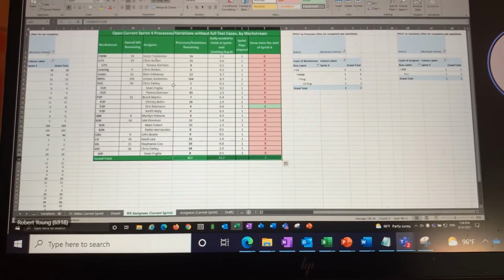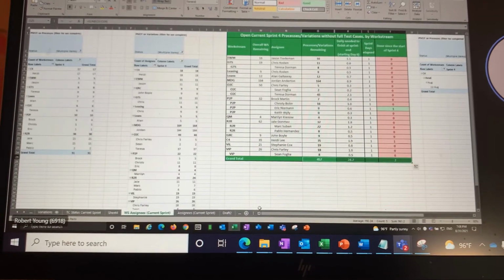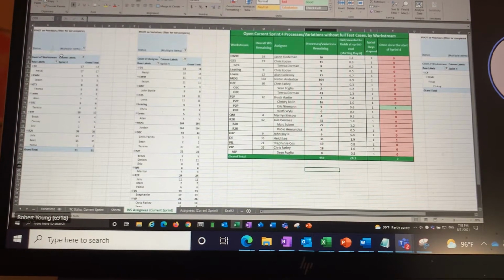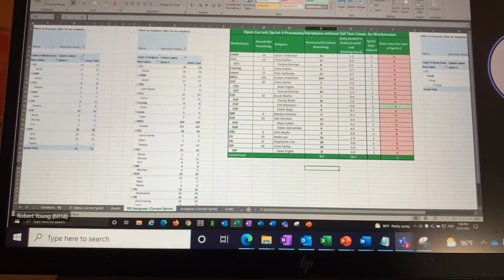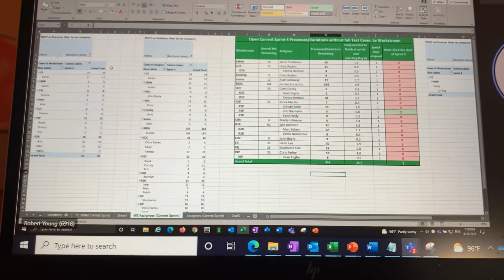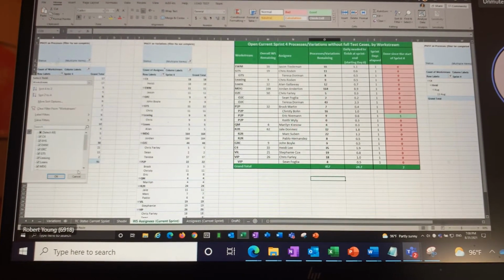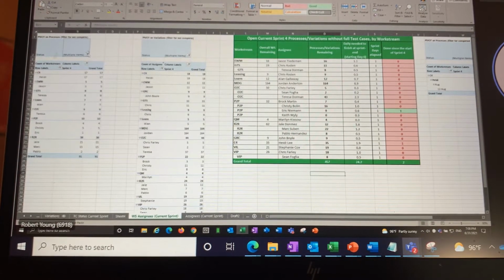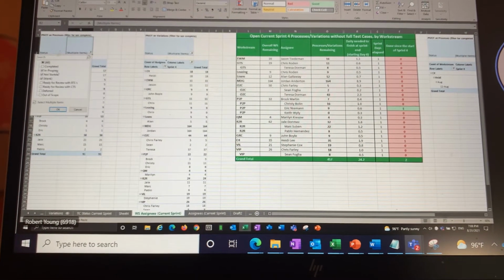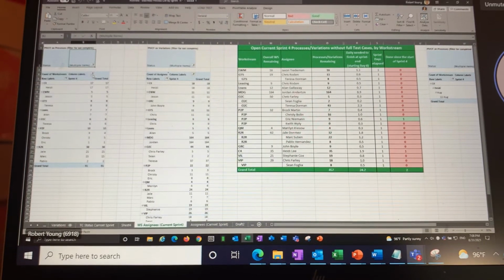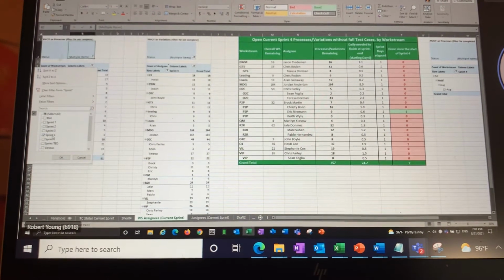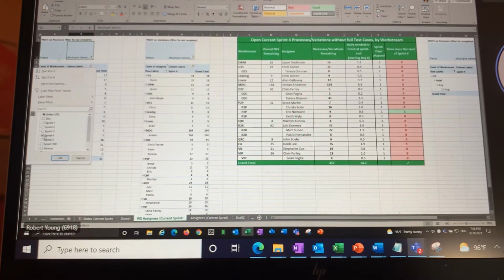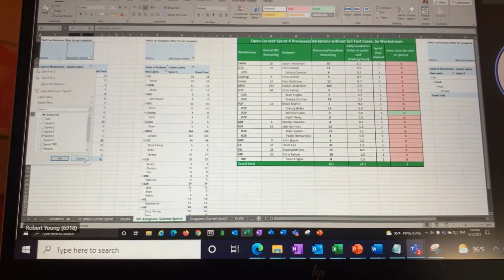Okay, so looks like it's already updated, probably because I refreshed this earlier in the day. All right, so the same conditions. This is looking at sprints. It's looking at all work streams except for TM. In progress, not started blank, and sprint 4. Right. So remember, when we go to sprint 5 to create for the current one, you have to unclick it, change it to sprint 5.